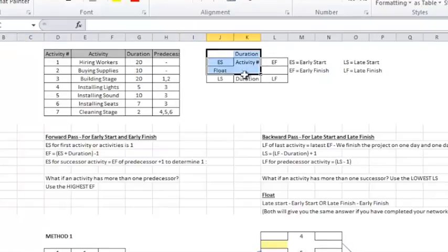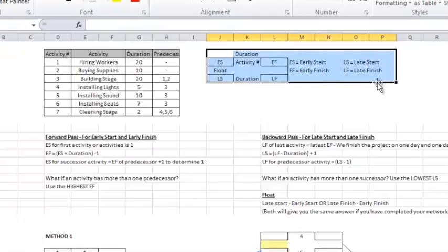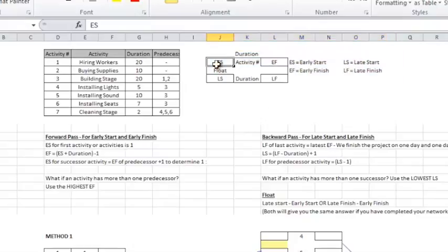Over here, let me highlight this, we have a legend. And that legend is showing us these rectangles that we're using to map out different fields, because we are going to be like computer project scheduling software. We're going to do some calculations. And the calculations that you and I are doing are what your scheduling software actually does for us. So we have the rectangles divided up with a little legend. See in this top left-hand corner, it's ES. That means early start. What is the soonest that this piece of work can begin?